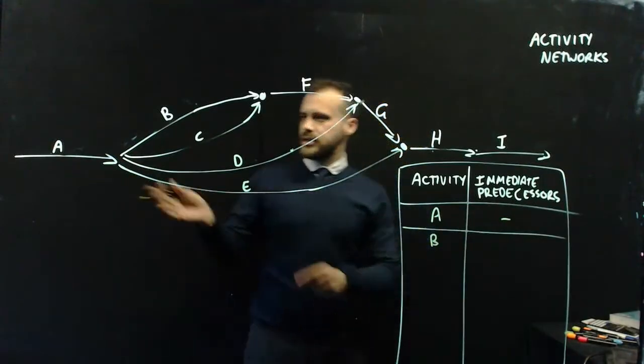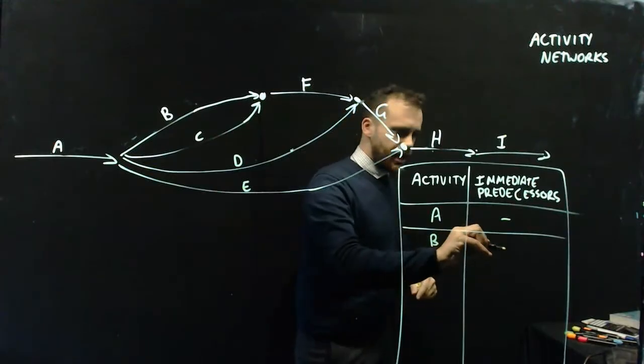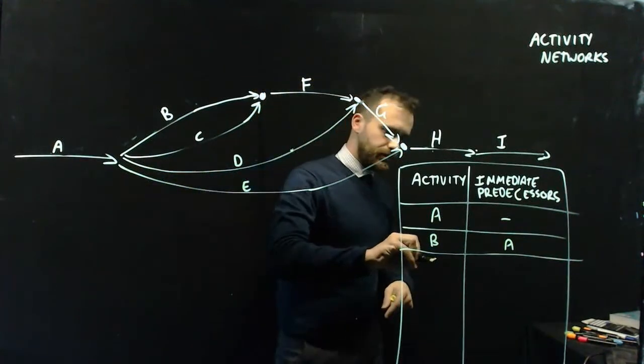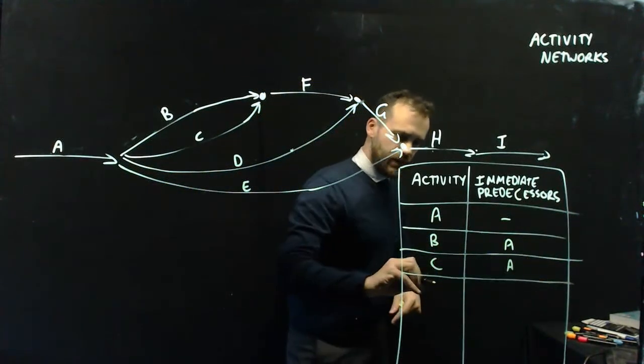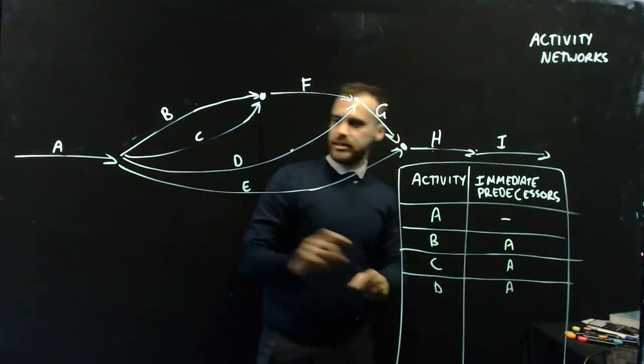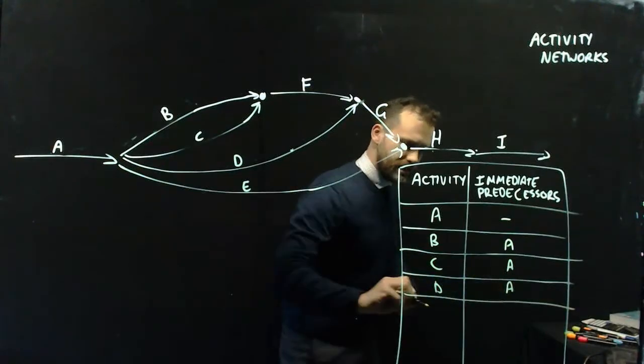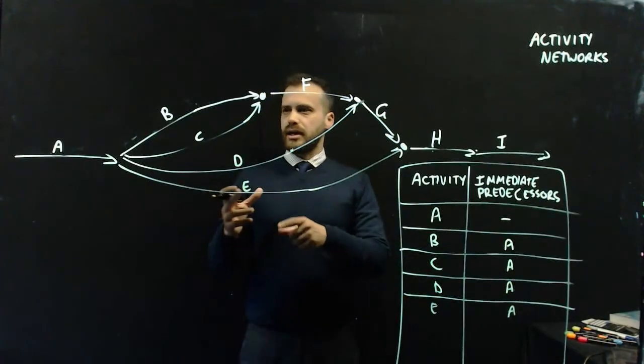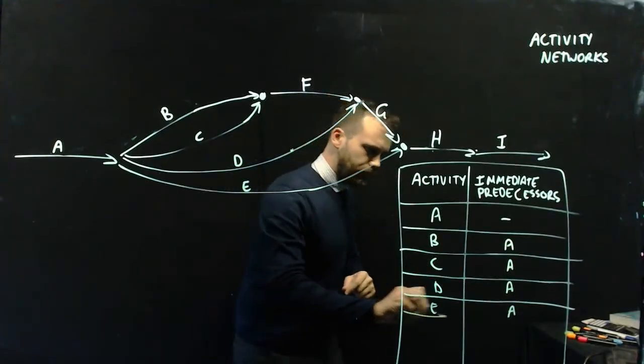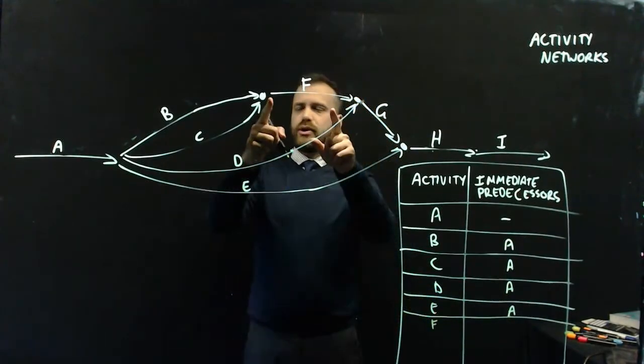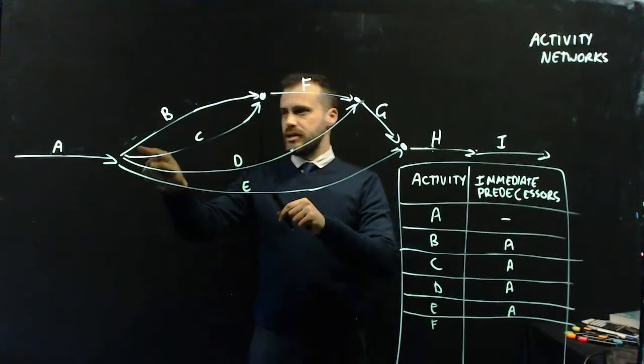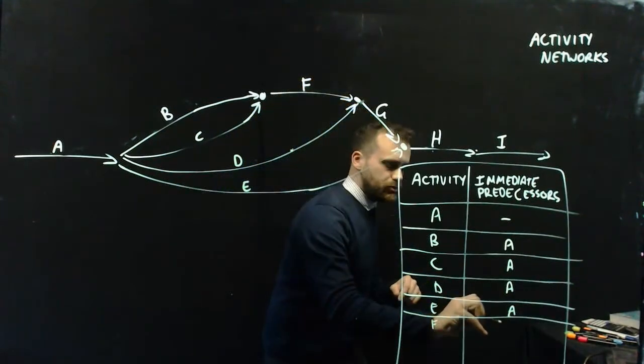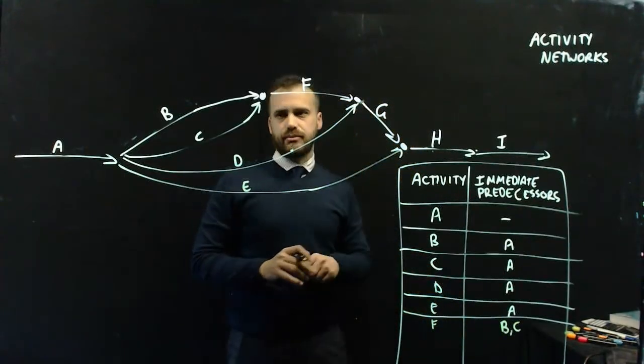Let's look at activity B. Does anything have to happen before B happens? Yes, A has to happen. A is B's immediate predecessor. What about C? Yes, A has to happen. And D, yes, A is the immediate predecessor there. And E, yes, A is the immediate predecessor there. We can see that A is the immediate predecessor to a lot of things. What about F? F has two immediate predecessors. B and C have to happen before F can happen.